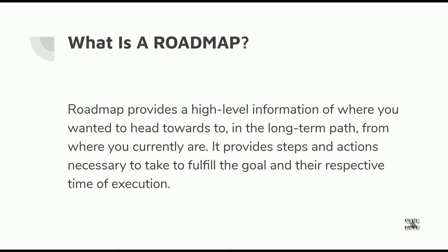I don't actually advise that you create a roadmap for a short-term goal. Usually, if it's about software development, then better yet create a Gantt chart, or just a plain timeline, for you to be able to see how you want to execute your deliverables.